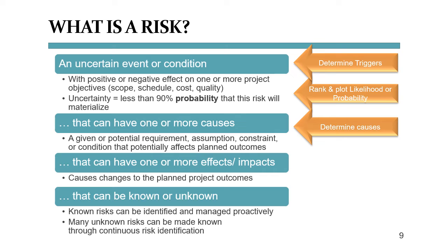Once we have those, and let me assure you, project risks are like potato chips. You never have just one. We need to rank the risks that we have found so we can attack the biggest ones first. Once we know those, we can plan how we're going to attack them with plans, by ignoring them, or, yes, really, by shifting the blame and the consequences to someone else.